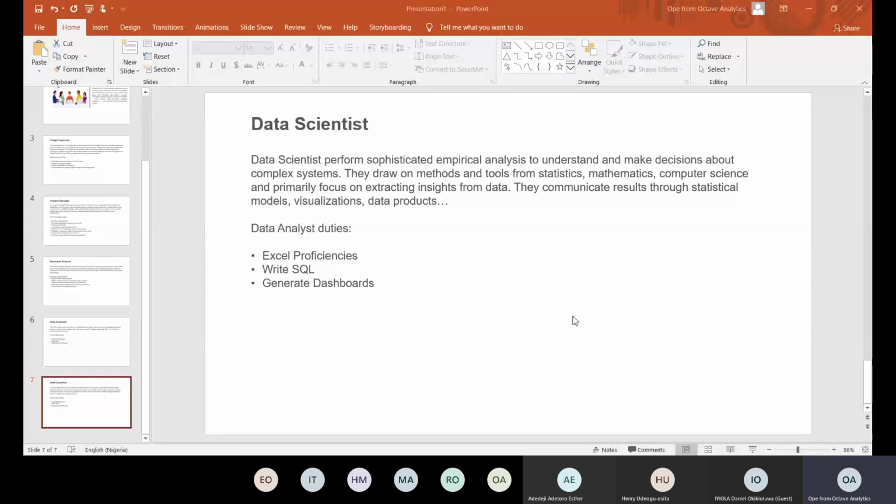Today, I'll be working on the remaining module to complete the transfer feature, full stop. So everything I've said is within, let's say, 20 seconds. You understand? So there's no story at all during a Scrum meeting, and Scrum meetings are effective that way because as a project manager, you are just getting the main, high level details from each project, and that helps you to have an overall understanding of what is going on within the project.